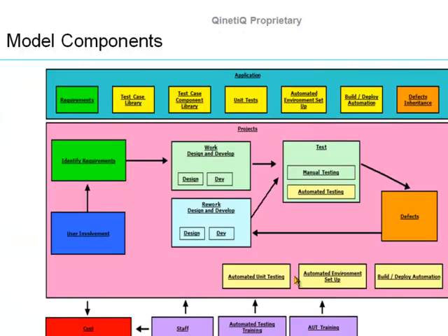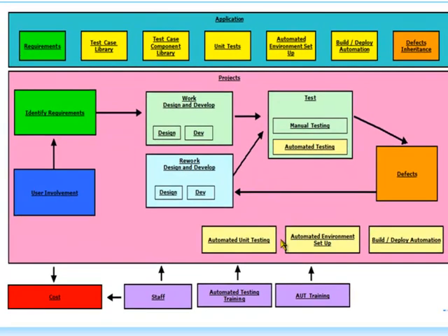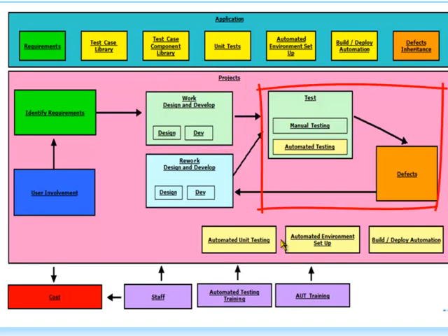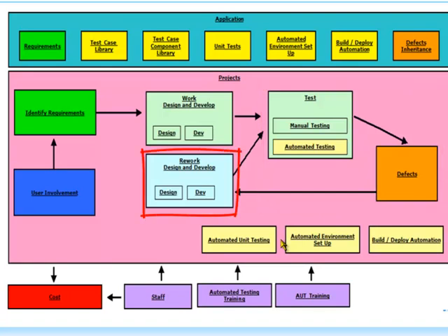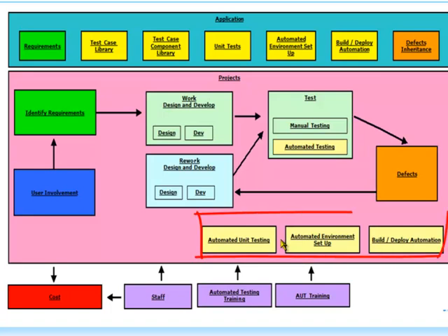So we worked out these software diagrams with the client for each of the various functional areas. So we had user involvement, adding to the requirements capture element. That then feeds into the work which is designed and developed. Then on to testing, which identifies defects, which then results in rework. And when you carry out rework, there's a chance that we actually introduce further defects, so you carry on this testing rework cycle.